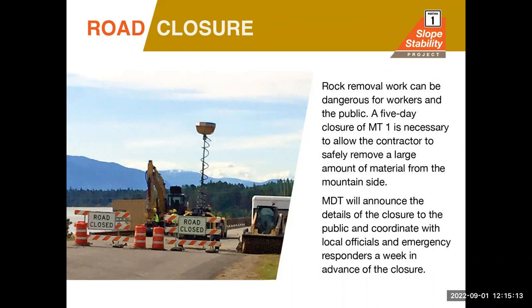The time frame for our 5-day closure is expected to be in early October. For the rest of the project time, which will start approximately the second week in September, we'll expect single lane traffic alternating at night, and then single lane traffic alternating during the day with 30-minute delays.